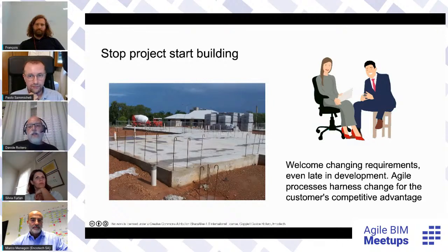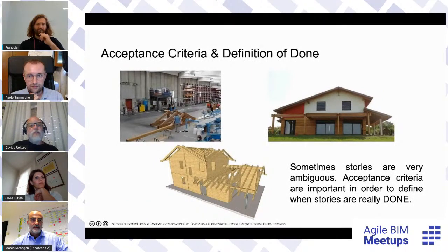Another challenge was the definition of done and the acceptance criteria. Acceptance criteria need to grow further. Compared to the first sprints, the awareness of what is expected as a result regarding the content of a post-it has grown tremendously, but still needs to improve. The cost benefit to take into account is that the more these aspects have to be treated and described in the post-it, the more time the product owner will have to use to write them. It is a struggle between the product owner's time and the team's outcome. We are searching for the good cost benefit between product owner's time and team outcome.